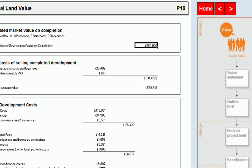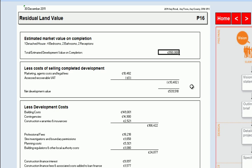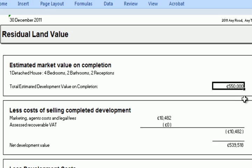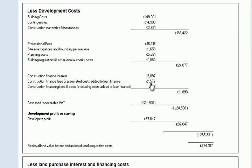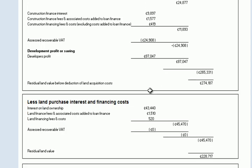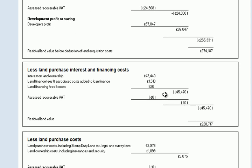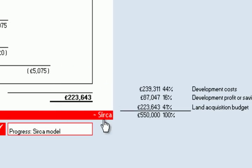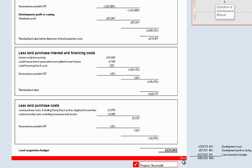We click through to a summary page — one of two summary pages. This one is for land; the other gives all development costs in a different order. This format is what you would expect any surveyor or anyone in the development market to use. It's called a residual land value because you take the end value you hope to achieve, look at all the likely costs you could incur in completing the project to have a house ready for sale, and what is left is the residual — the remainder. This is your land acquisition budget: the amount you could afford to pay for the project after accounting for all your costs.